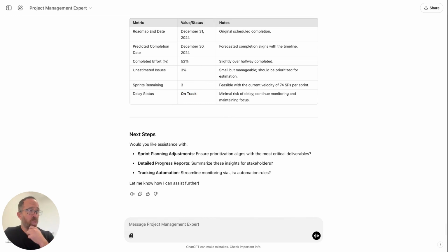Now, two more cool things that I want to show you. One is that I want to monitor the budget of my epics. Suppose I had an epic and I gave it 30 story points, and I went beyond that because I've added more stories and refined the content. Suddenly, 60 story points. I want to know about those out of budget epics.